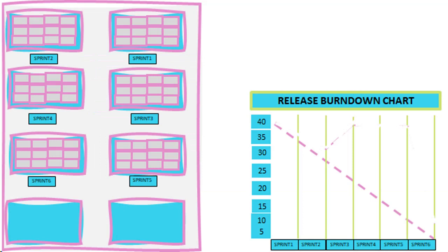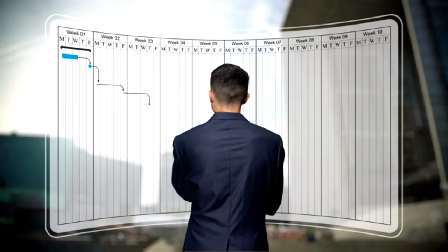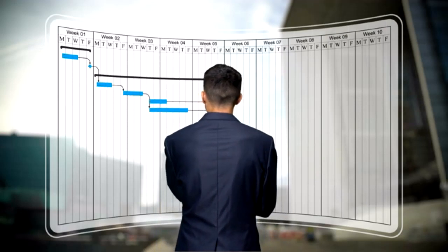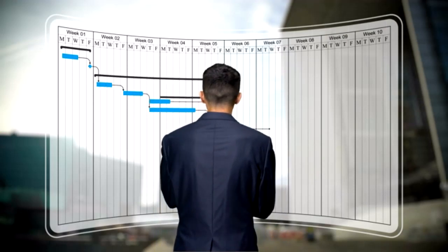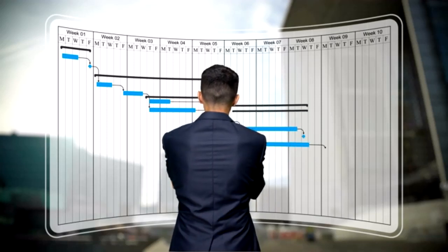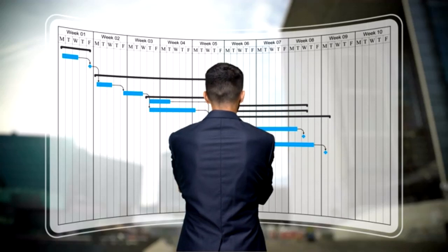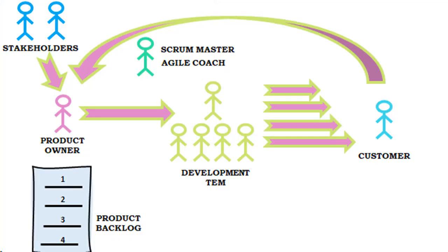Development life cycles. Development life cycles can be predictive, iterative, incremental, adaptive, or a hybrid model. In a predictive life cycle, the project scope, time, and cost are determined in the early phases of the life cycle. In an iterative life cycle, the project scope is generally determined early in the project life cycle, but time and cost estimates are routinely modified as the project team's understanding of the product increases.